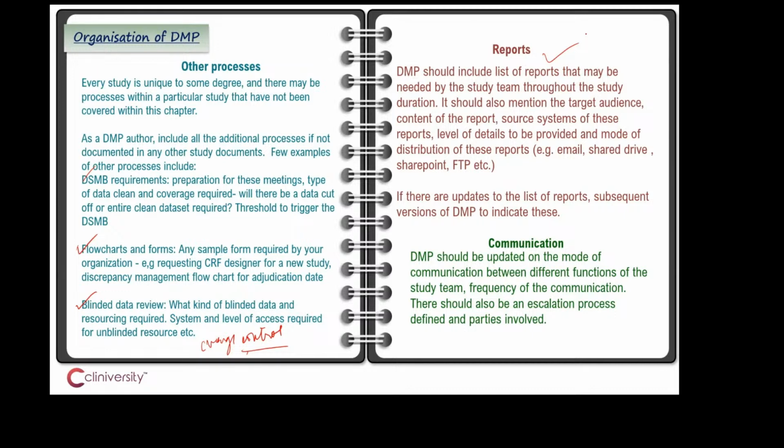Every report will also talk about when these should be extracted, the frequency of their generation, and how these reports have to be distributed across the team. Should these reports be put into a central SharePoint server, a shared drive, or could they be emailed to the respective people who are the recipients? If there are any updates to this list of reports, your later versions of the DMP will also include that there are updates to the list.